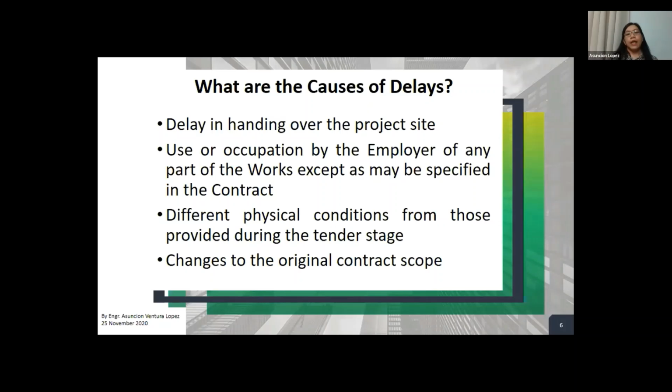First is delay in handing over the project site. So there are cases that the project is already awarded, the project has already been given the notice to proceed. However, the project site is still not available. It's still not been handed over by the client or by the employer to the contractor. So that can be a cause of delay that may be entitled to EOT.